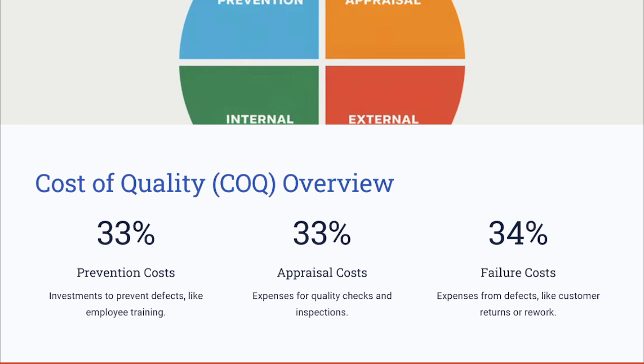High failure costs indicate poor quality management. So whenever you have high failure costs, rework, and defects that you have to deal with, it means that you have poor quality management. It's very important to balance the prevention and appraisal costs to minimize the failure costs.